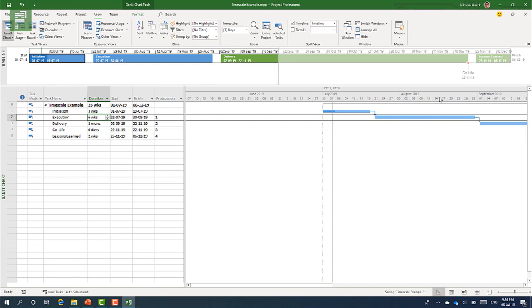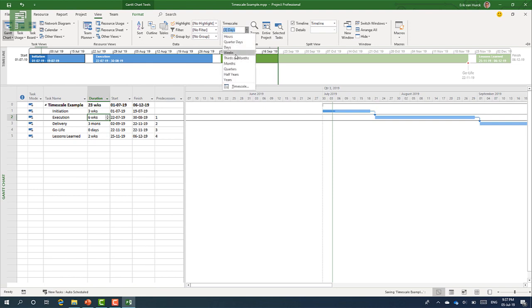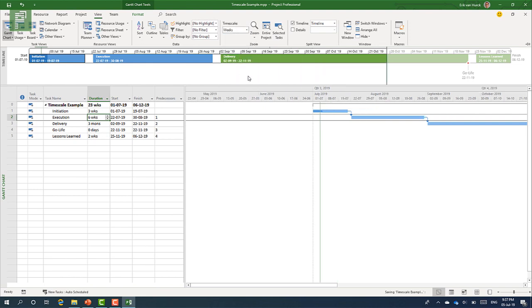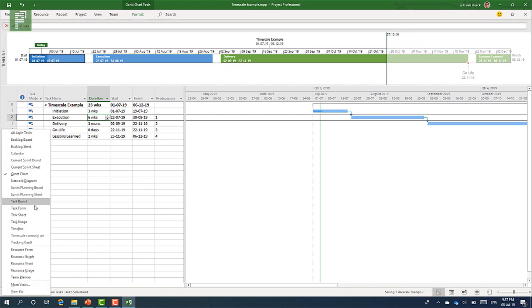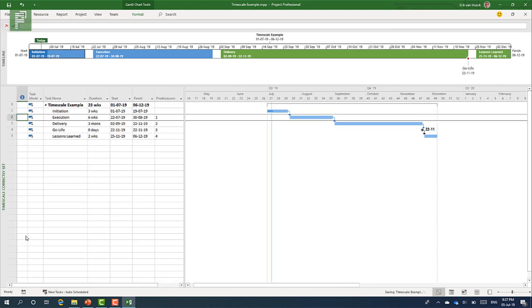So, this view now is screwed. Now I don't have that week numbers anymore. I have the months still and I have quarters, but it's offsetting. And if I return to the weeks view, it doesn't have my week numbers in here. But, luckily, I saved my other view. So here's that timescale correct set. If I navigate back to that, it has my week numbers. So this is the way, I would say, is the ideal way to go about having that fixed timescale.